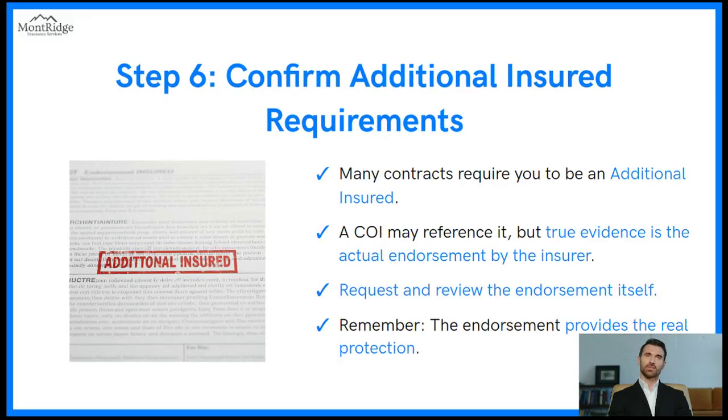Step 6. Confirm additional insured requirements. Many contracts require you to be an additional insured. A COI may reference it, but true evidence is the actual endorsement by the insurer. Request and review the endorsement itself. Remember, the endorsement provides the real protection.